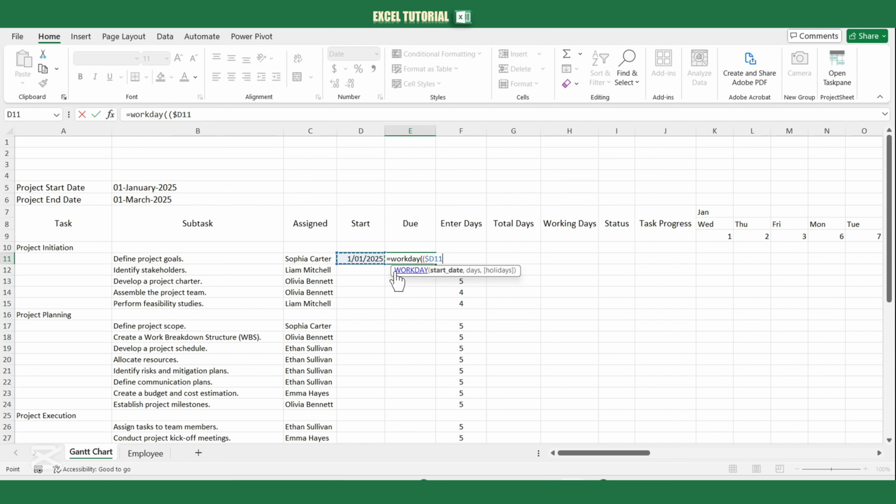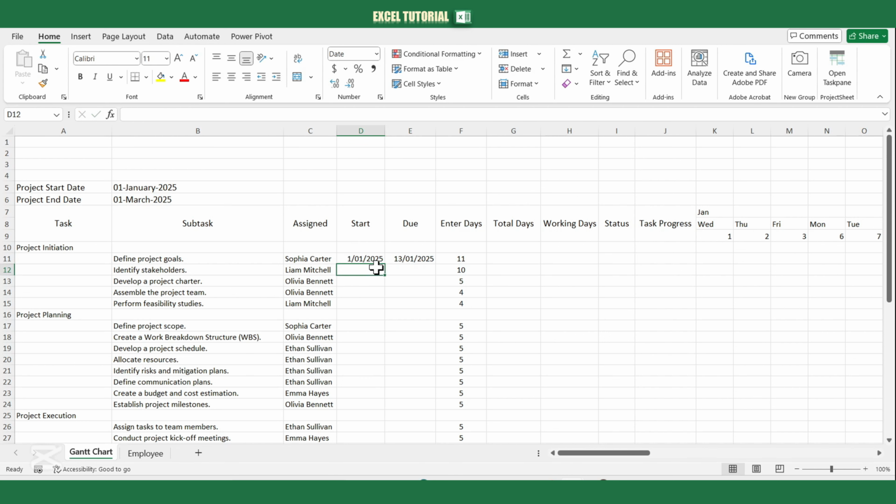The formula for the due date is straightforward. Start date plus the days added in our helper column. However, if the result falls on a Sunday, we must apply the same approach used when calculating the month, subtracting 1 and adjusting the day parameter to move to the next weekday. Now, take your time to organize the columns properly. Additionally, in cell D12, enter a formula using the WORKDAY function, selecting the previous date and moving to the next weekday. Once done, drag both formulas down and remove any unnecessary spaces where no dates are present.